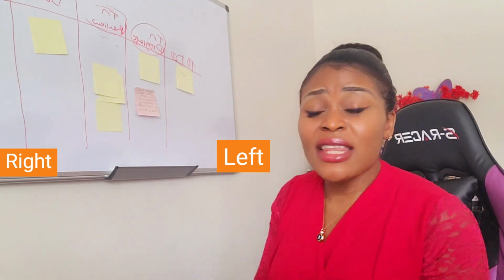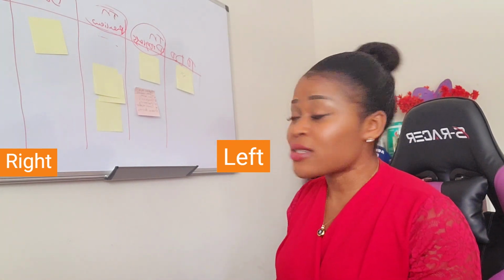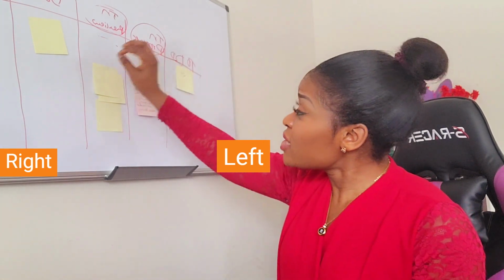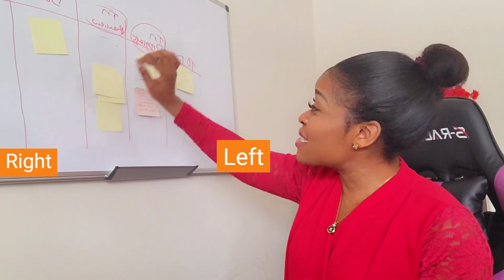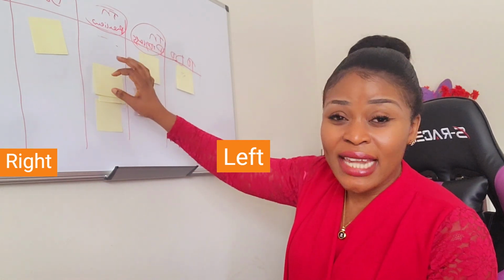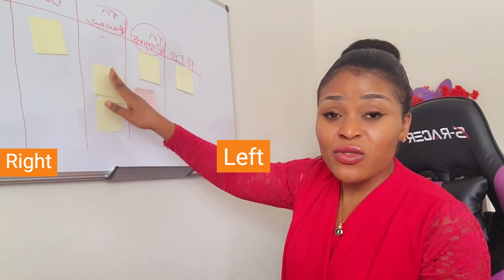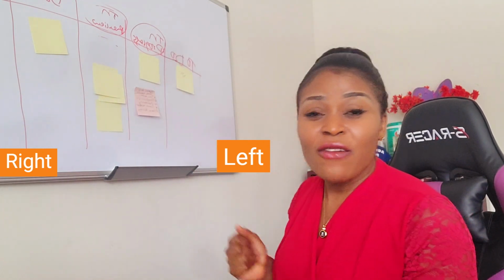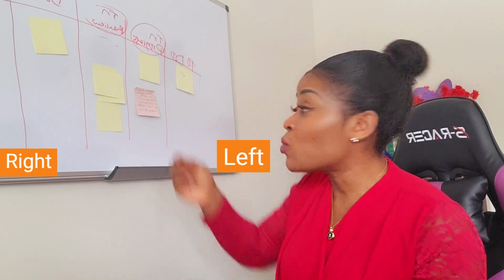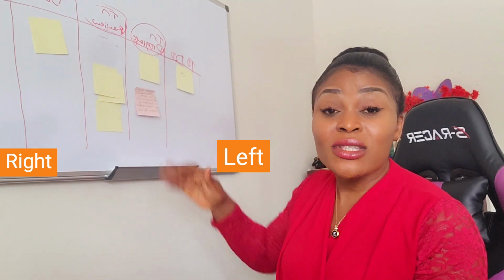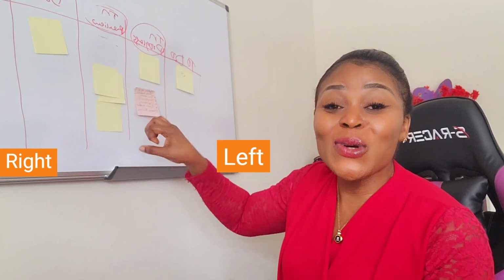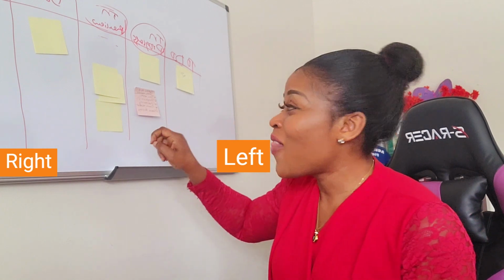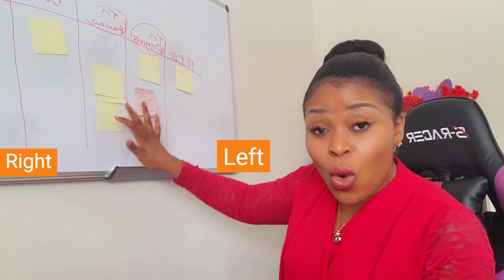And then one other thing that I like to make sure I'm focusing on is, if I notice that a particular work item has been sitting there for, let's say, 2-3 days, and I have configured my metrics to tell me if a work item has been sitting there for more than 2 days or 3 days, it will turn red on me. You see, it will turn red or it will turn gray to show that the work item is old there. So I color code our boards.